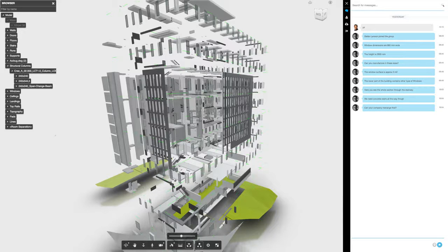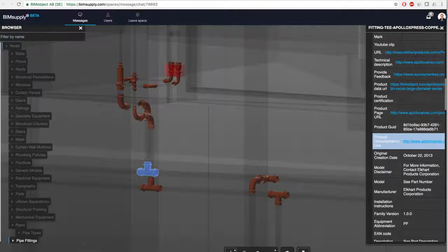This is just another, call it exploded view, where different actors can access the exact same data warehouse and model of a facility and not do estimating. We don't do that anymore. Another part of the forget disruption, we destroyed estimating. Now we cost define, because we have technology. It's ones and zeros. We can count how many doors of the EAXY123 model by door manufacturer Hundinger there are, and we know that we don't have to say, I think we have, I better add 10%. It's there. It's real.